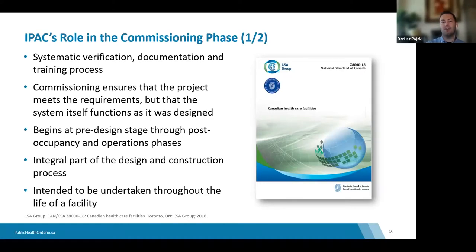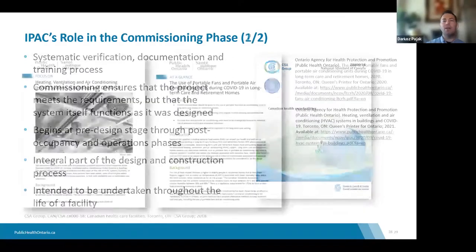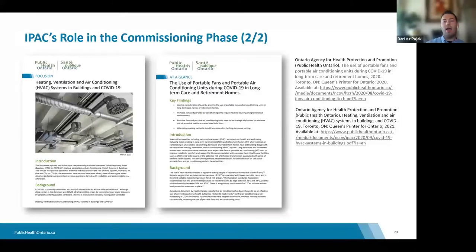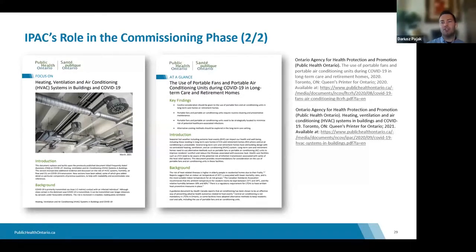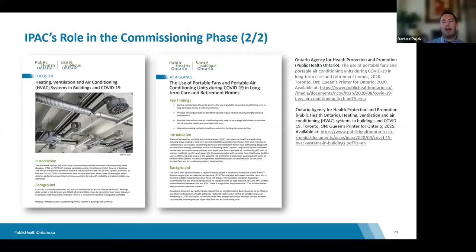Continuing with the commissioning phase, PHO has developed resources on HVAC systems and portable fans and portable air conditioning units — developed during the COVID-19 pandemic but applicable broadly. When meeting with facility staff, you want to refer to these documents to ensure all these approaches to keeping residents cool, especially during the cooling season, are done safely and don't promote bacterial growth or introduce risks to the resident population.